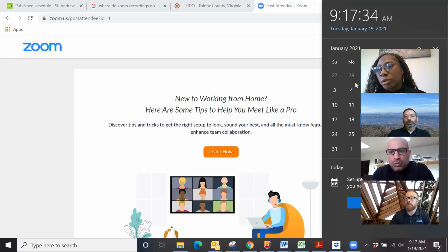So from Monday the 28th until Friday the 8th, right before that week of payroll. Right, that's correct. So you and I approved T-sheets on Monday the 11th. We will have approved the prior 2 weeks. Beth runs it on Tuesday, pays it on Tuesday. She runs the job costs on Wednesday. So it's always 2 weeks back. Correct. I apologize, I needed to restate what I had said.